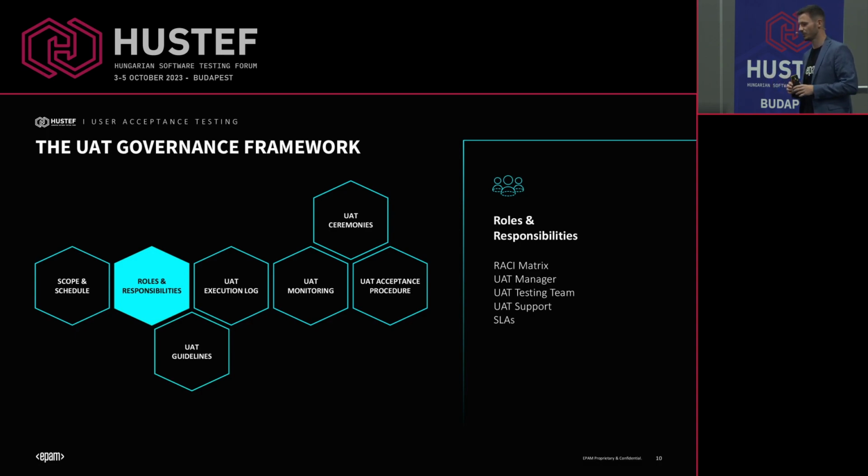And in line with this, I would mention the service level agreements, the SLAs, that can help us to accelerate this whole procedure. For instance, an SLA is about in what time frame and how we need to react in case of any issues. In our case, for a P1 problem, where the environment is down or a critical feature is not working, the SLA was that within 1 hour the team had to analyze the problem and provide recommendations on how and when we can fix that. So it can set the context too.